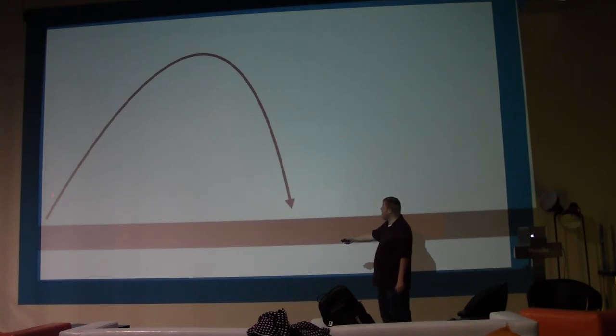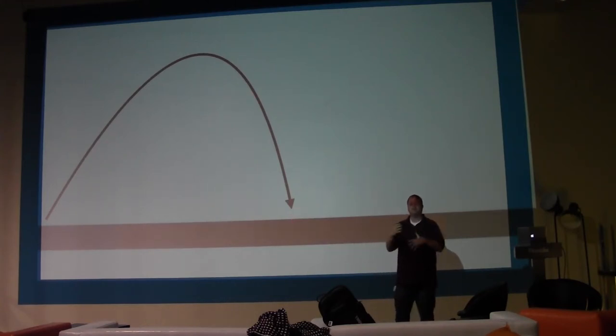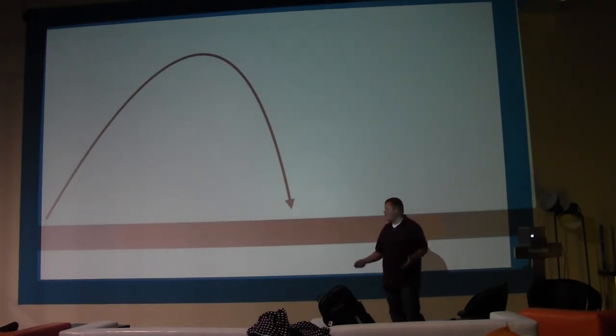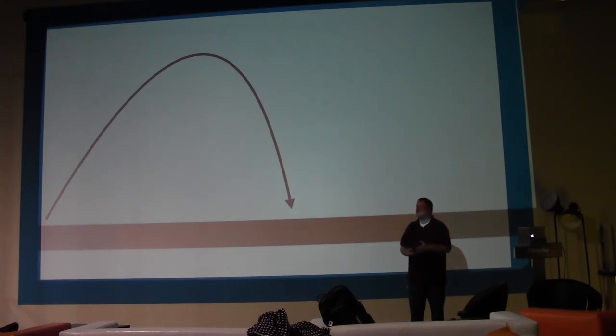So what you see here is this idea that, okay, at the beginning of a project, we think it'll take about this much time to get it done. We'll go through and estimate things, and at the beginning there's so much unknown that from here to here is this margin of error area. And it's wild. You might feel like, why are we even estimating? Because it's that huge.